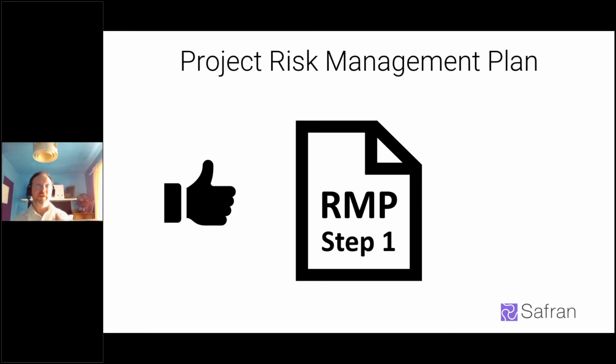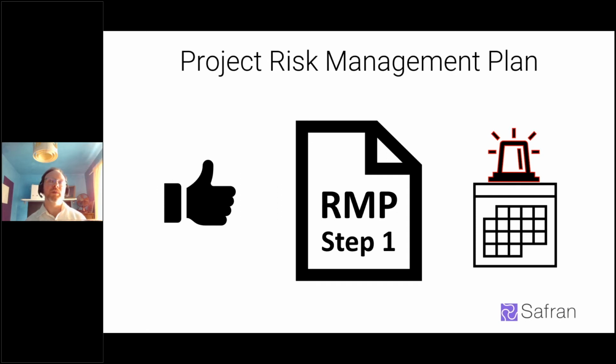It could be anywhere from 5 to 50 pages long, not necessarily read and understood by everyone on the project. And of course, like all documented management plans, it will be picked up by an auditor once per period to check and police that you're actually indeed doing the things that you originally stated. Now, what that last point about the auditors really means is that of the few people who do actually read and use the risk management plan, they probably only review and edit it once per year themselves, if that.